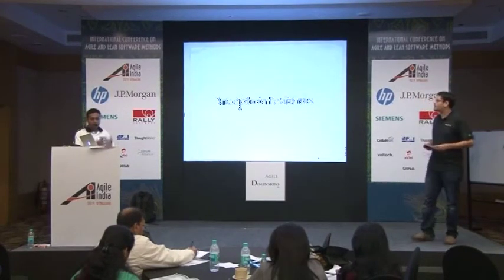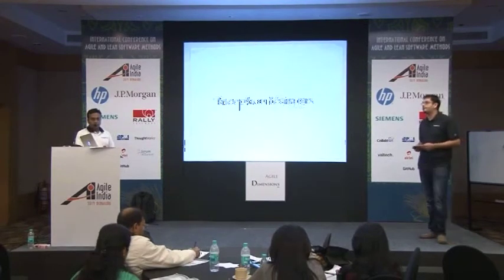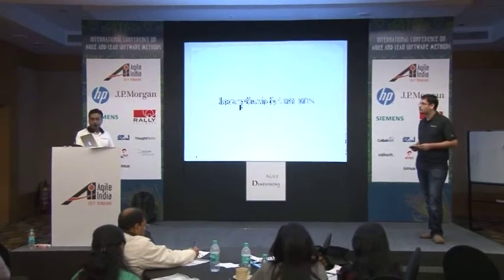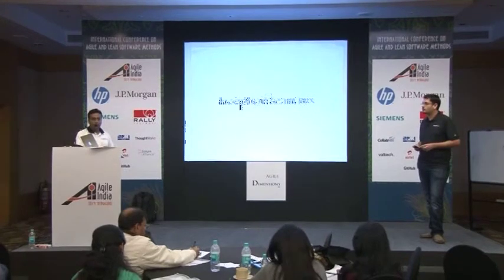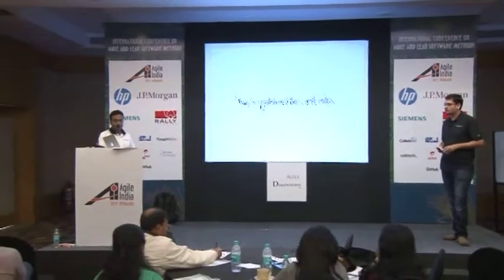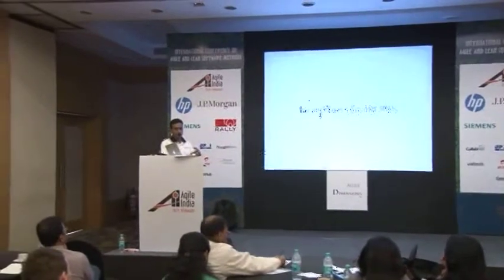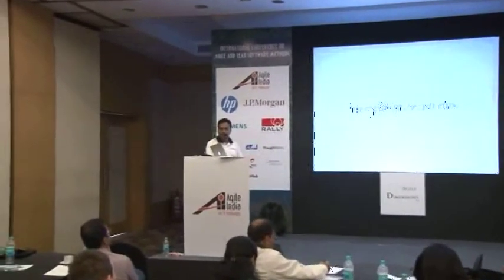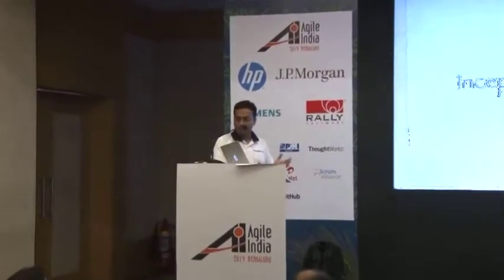Typically, you do that in a co-located fashion with the client stakeholders, and from our experience, it's really important that this team who goes and meets the client stakeholders to understand the project broadly needs to have cross-functional representation from all the locations, from both locations in this particular scenario. So it's important that you have business analysts, as well as devs, as well as QAs from both locations.